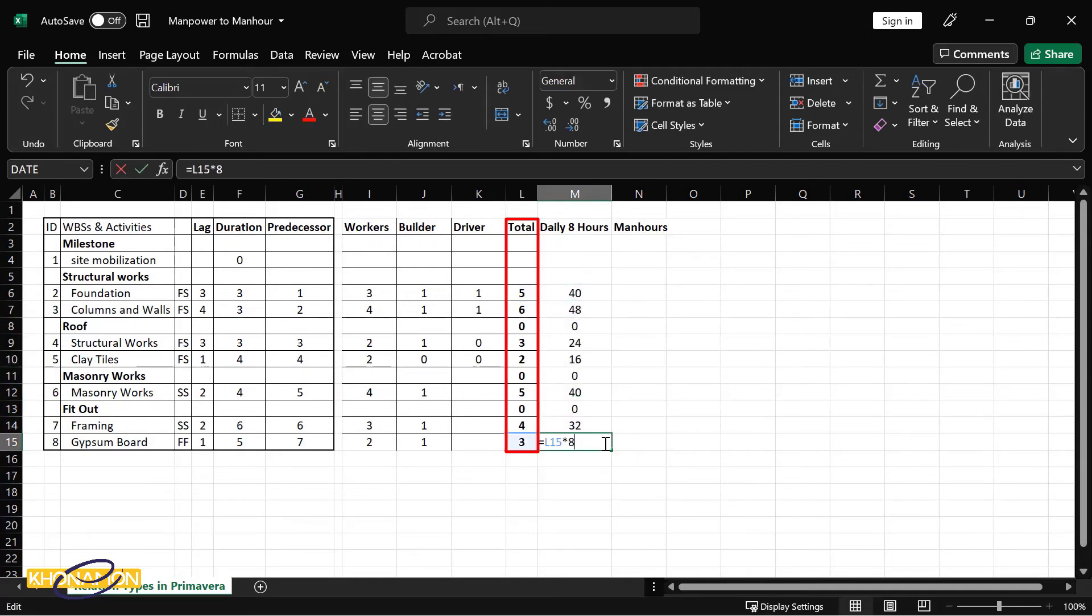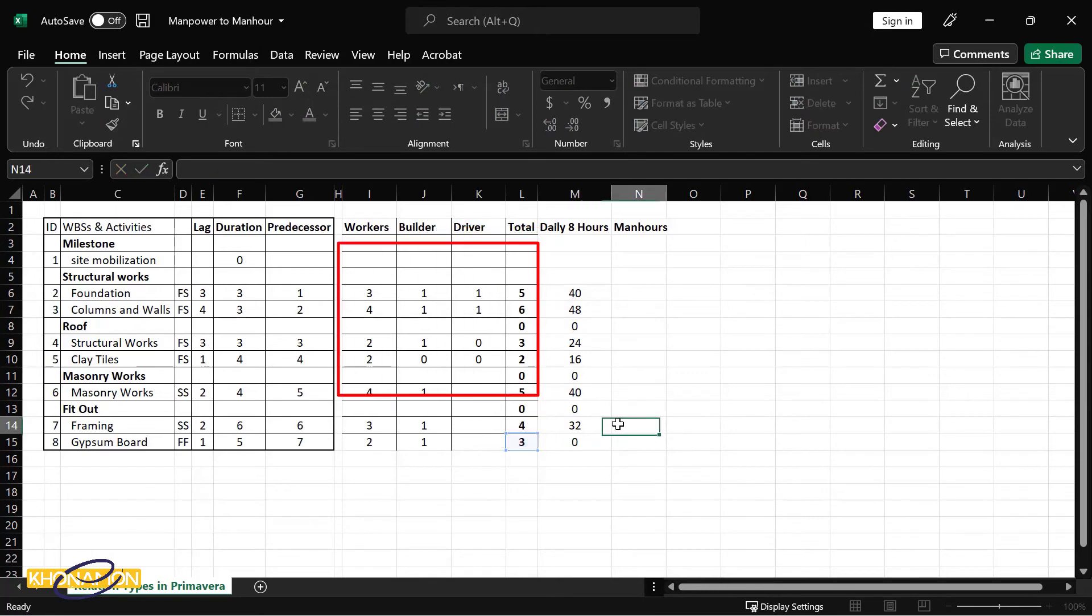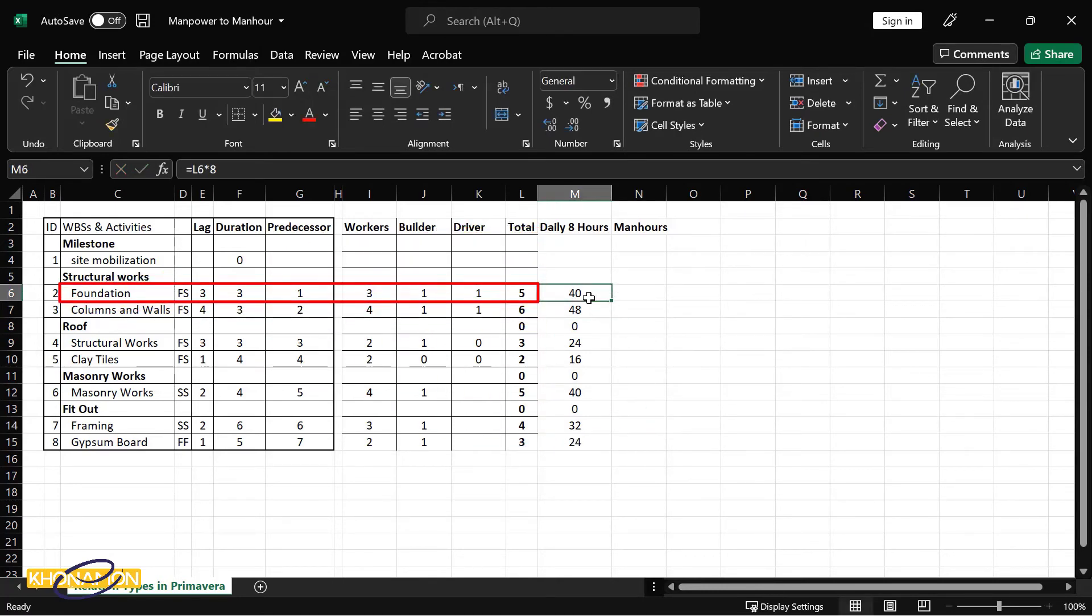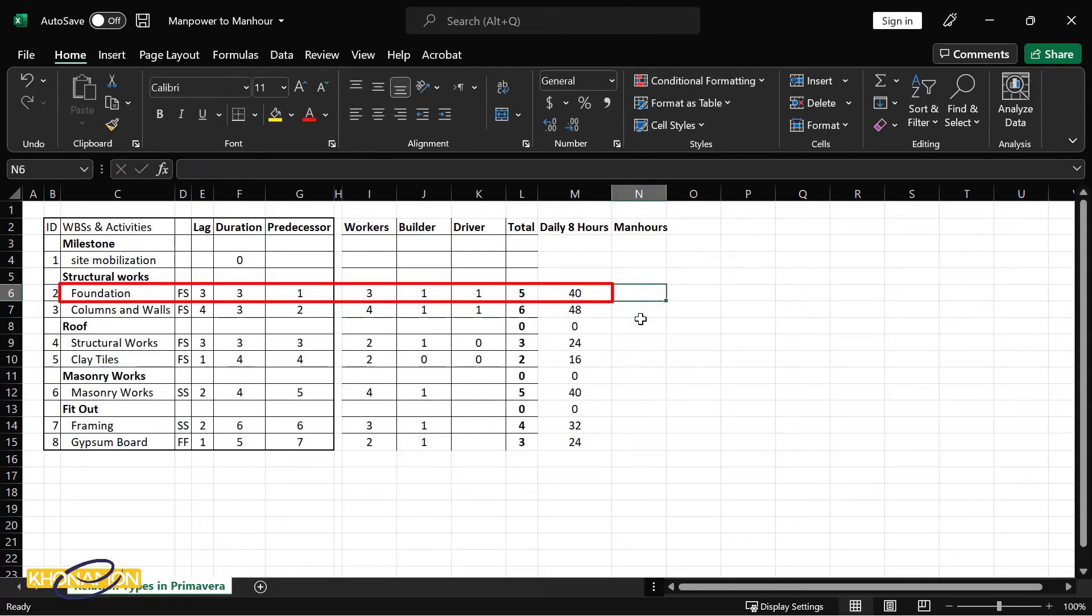The foundation total direct manpower is five. And as I told you, we're supposed to work eight hours. I multiply five with eight. I get 40. So 40 hours is dedicated to work for foundation for just one day.